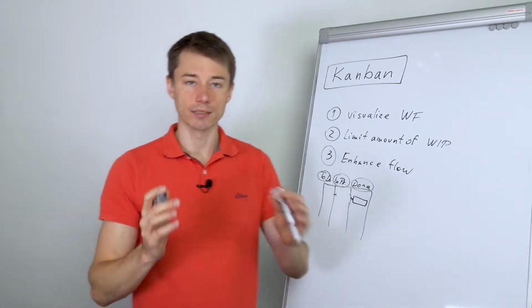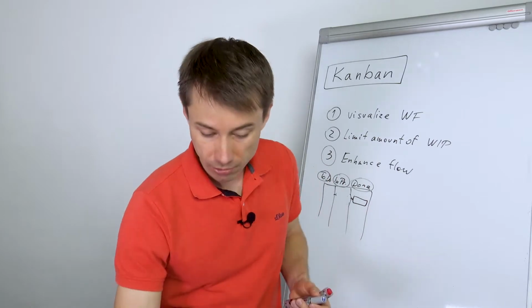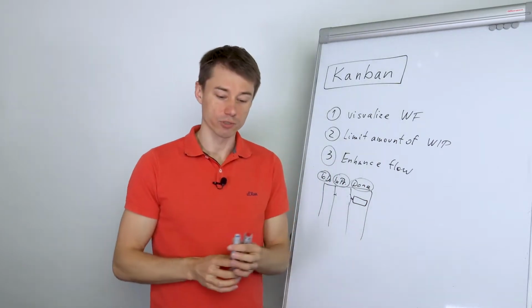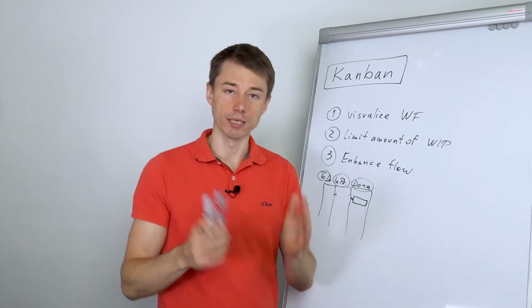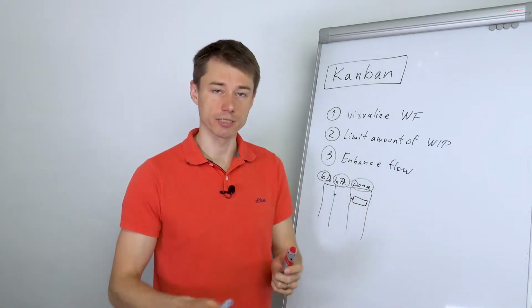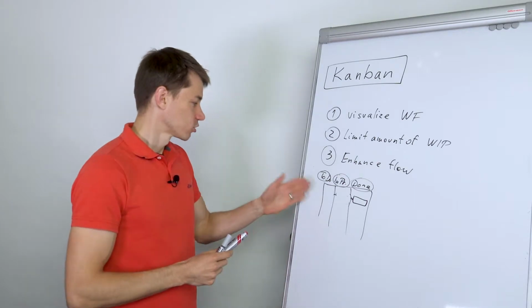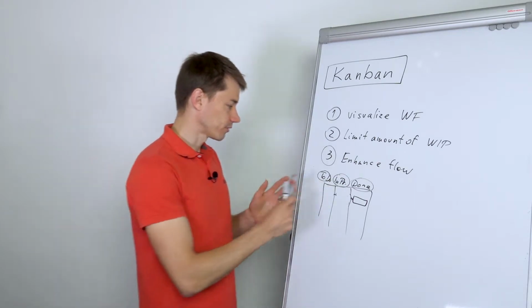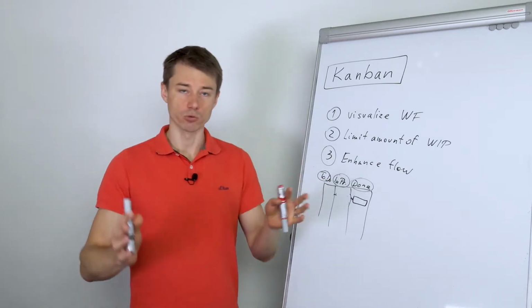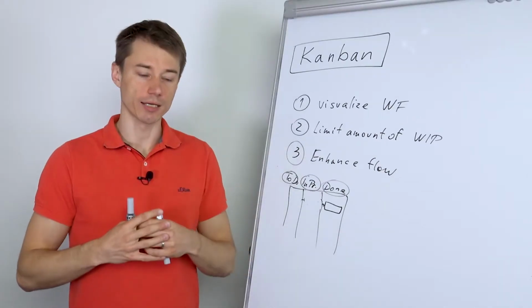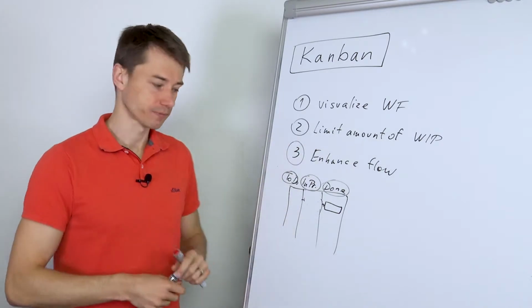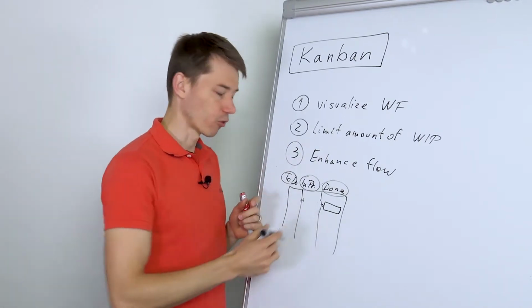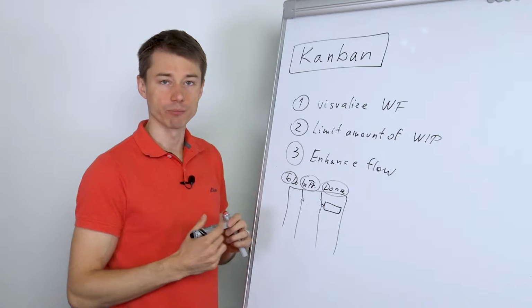But I can show you also another example with 4 columns. So for example, you have a backlog, you have selected for development, in progress, and done, okay, in this example. So you can go further and further in customization of the particular workflow. I remember in my previous company we had about 9 different columns, because as soon as you have more people working on the same project,